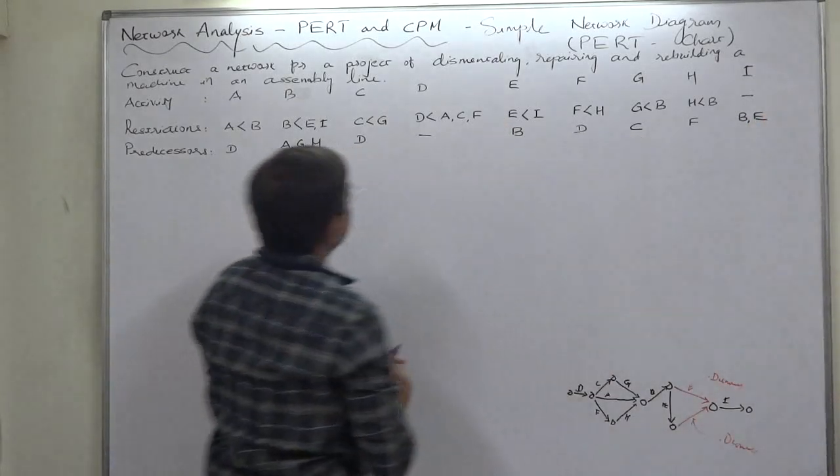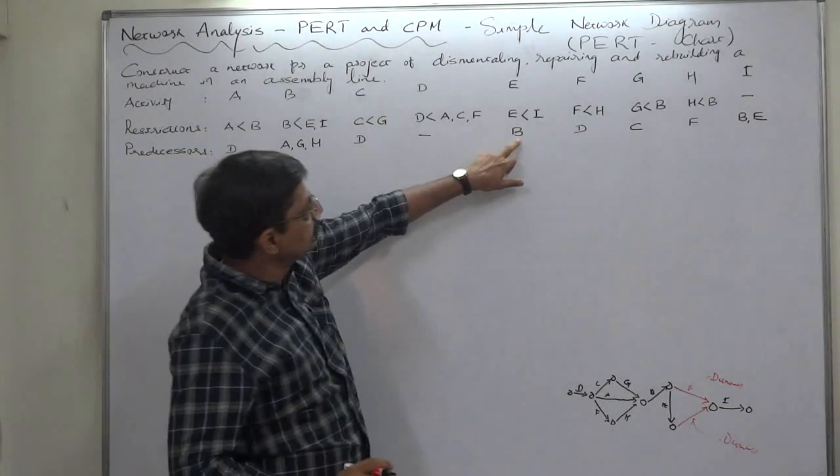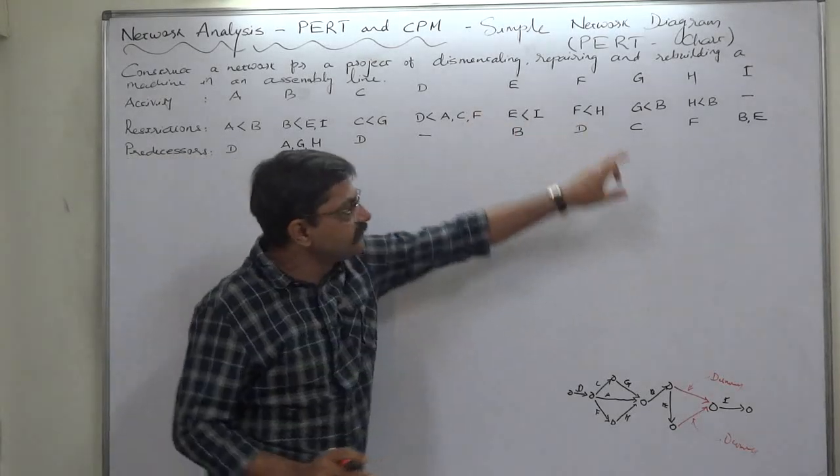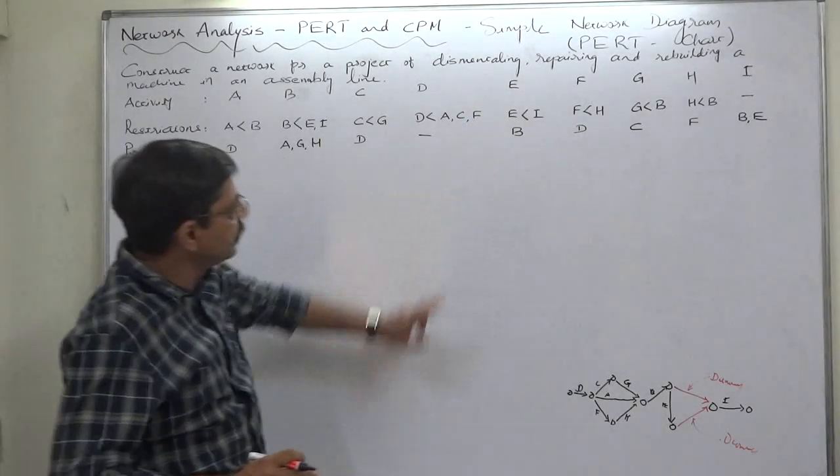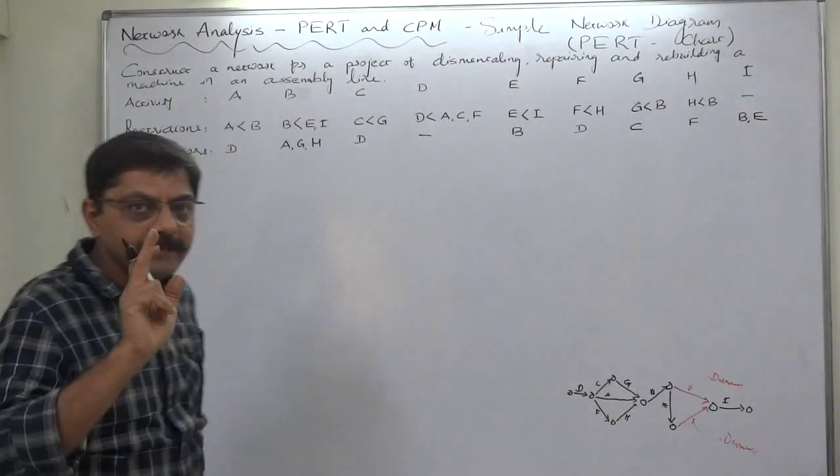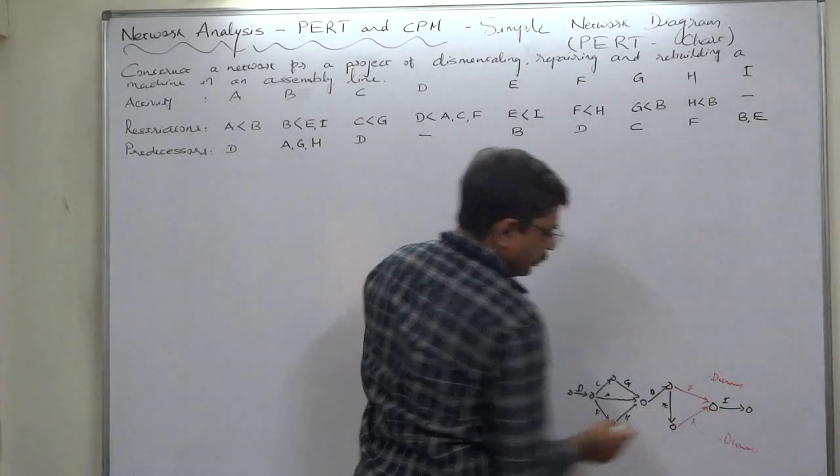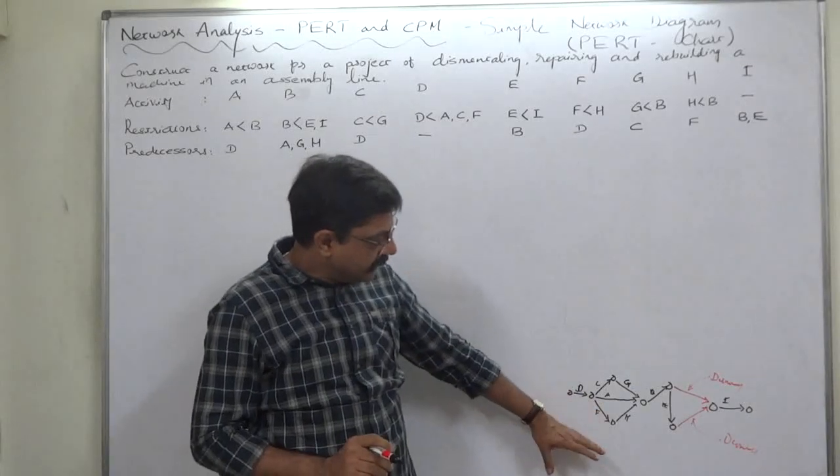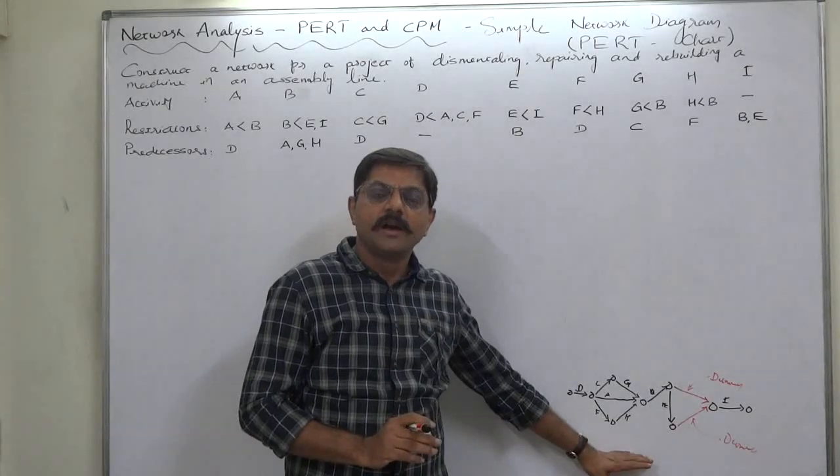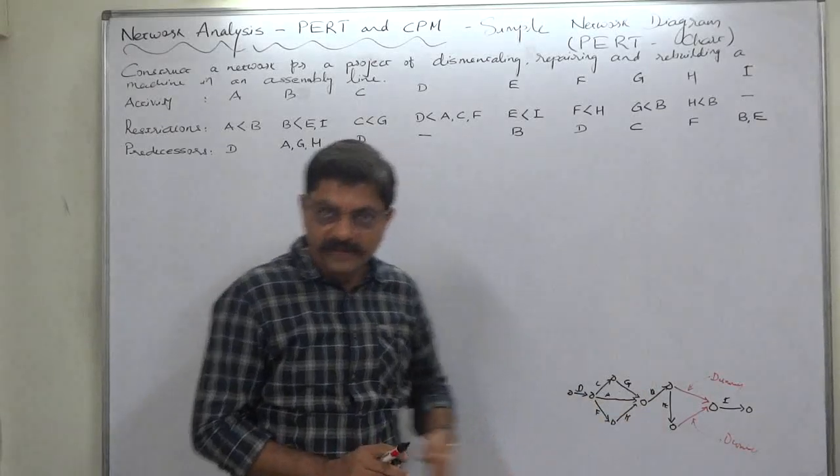And mind well, B is also the predecessor of I. So B is predecessor of E as well as I. Now E starts only after ending B, that means we shall have to use dummy activities. I have already drawn a rough work, to be very frank. I was able to do this rough chart also after drawing one or two other rough works.